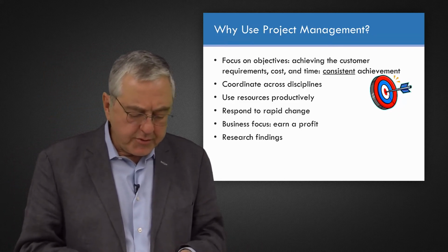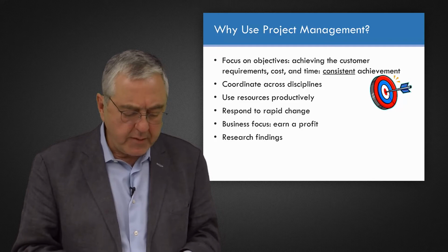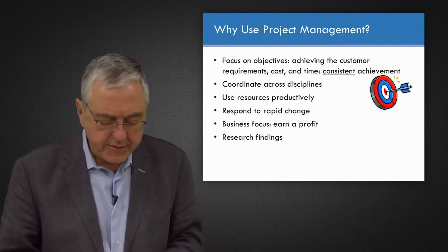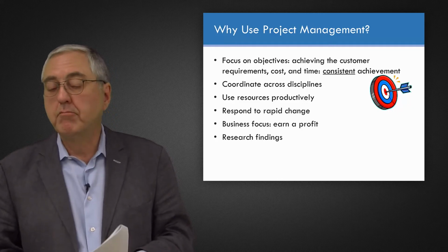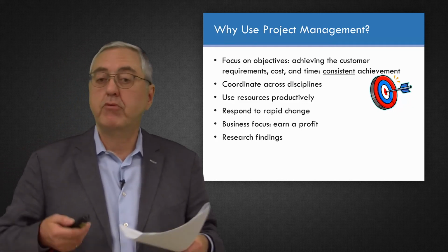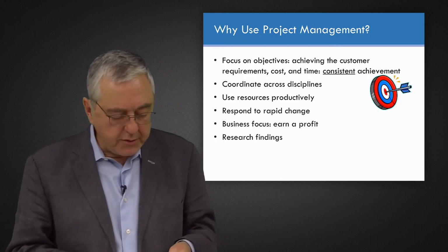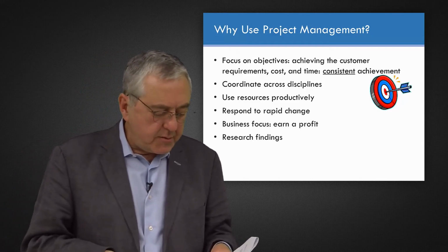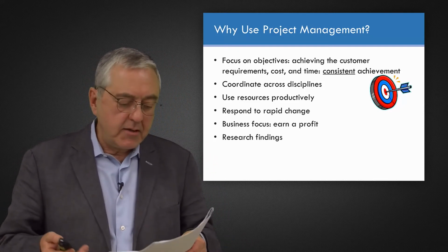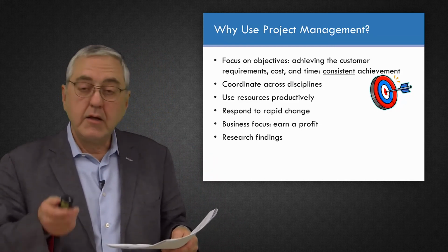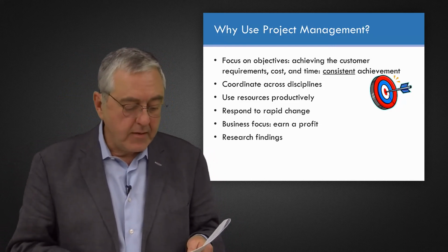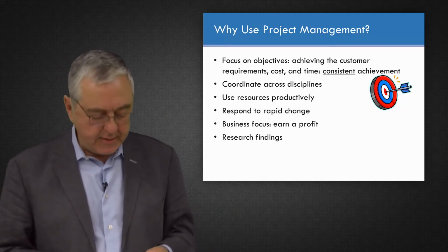And a PricewaterhouseCoopers study shows that 50% of these project failures is directly traceable to poor or no project management in terms of processes and tools. And that's evidenced by lack of planning, lack of good scope definition, lack of good scope control, poor estimates and schedules.